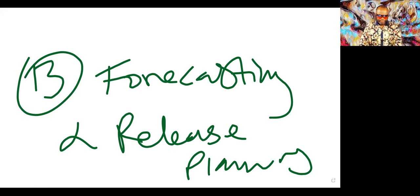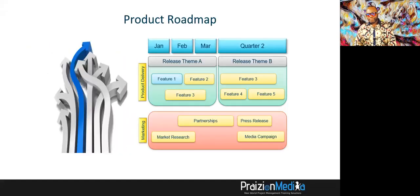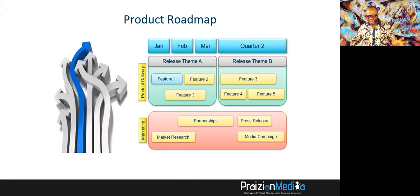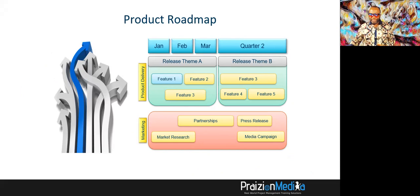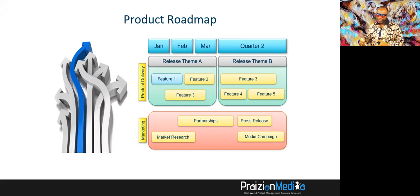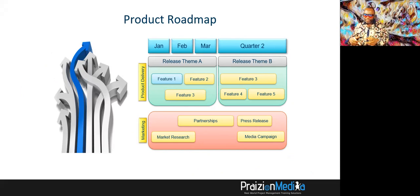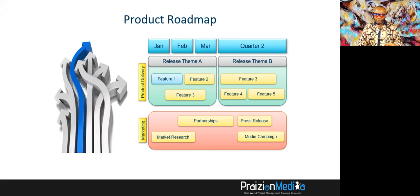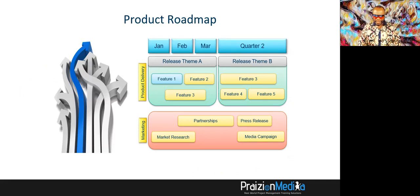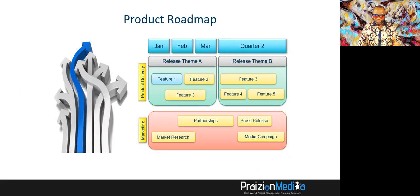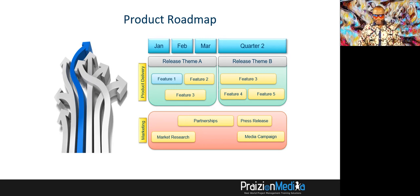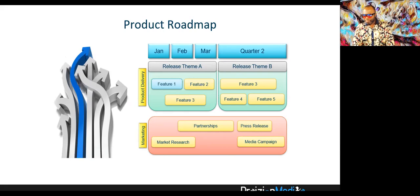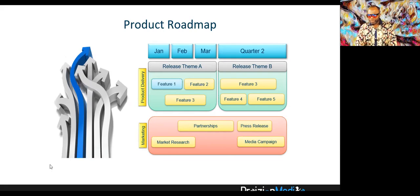So real quick here, we have the concept of roadmapping. Again, this is not one of the scrum tenants or anything, but the idea is instead of doing sprint planning, think about releases. Planning for releases could mean you're bucketizing several sprints together, and the increments from those sprints is what gives you a release. So you're thinking more long-term and in broader brush strokes.